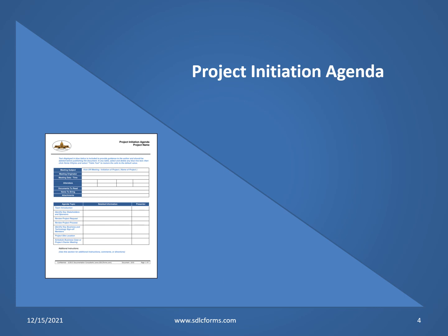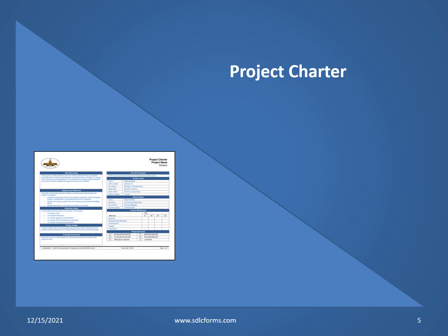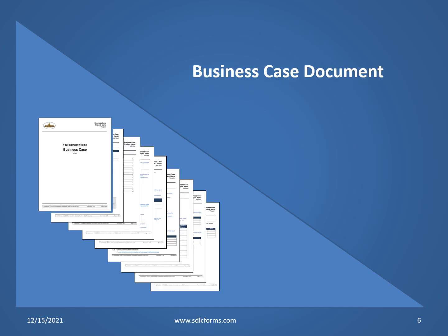The project initiation agenda provides initial project agenda for a kickoff meeting whereby key stakeholders, sponsors, and key business and technology members are identified. The project charter provides the business goals, objectives, and management direction for starting the project in this initiation phase. The business case document identifies whether there is a potential business value to the proposed project idea